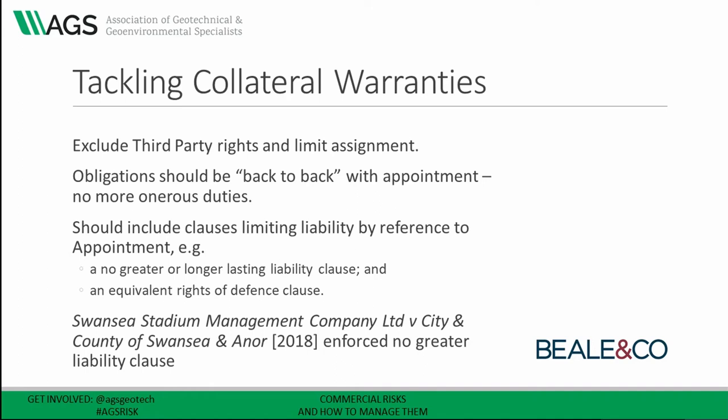The case of Swansea Stadium is an example of the courts enforcing a 'no greater liability' clause. In that case, practical completion was certified on 31 March 2005. The contractor provided a collateral warranty to the tenant sometime after that, containing a clause expressly limiting the contractor's liability to that which it would have had if the claimant had been named as joint employer — meaning liability to the tenant for defects in the original works would run no longer than 12 years from practical completion, not from the date the collateral warranty was signed. The court upheld that clause, meaning the claim that had been issued was four days late and was struck out. A good example of how useful these limitations can be.